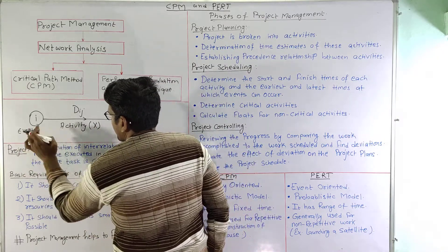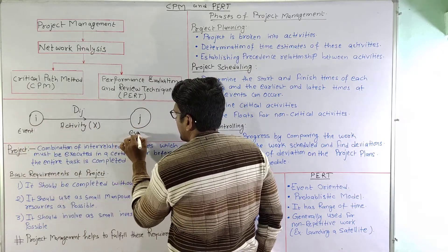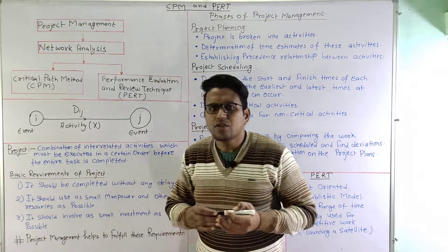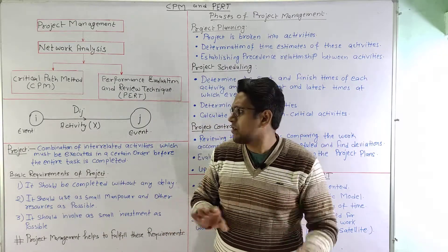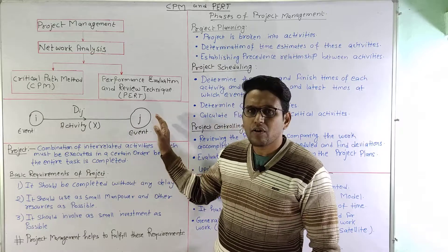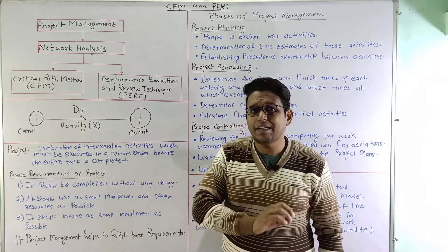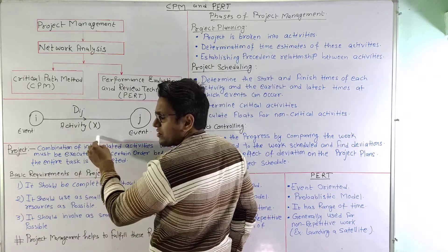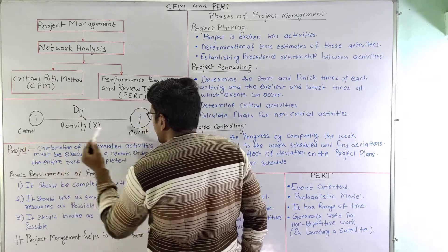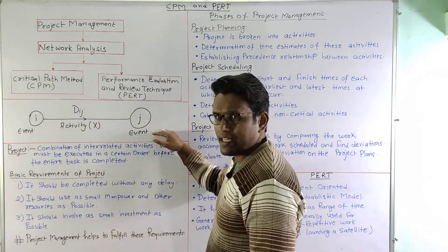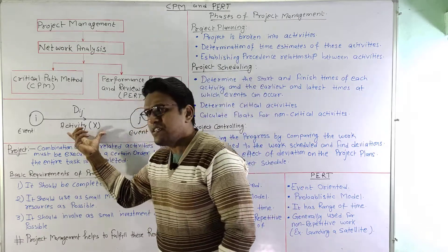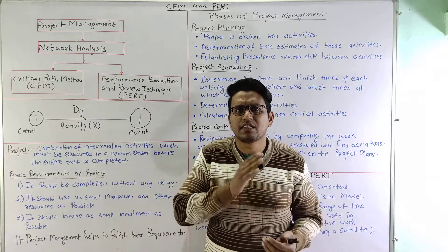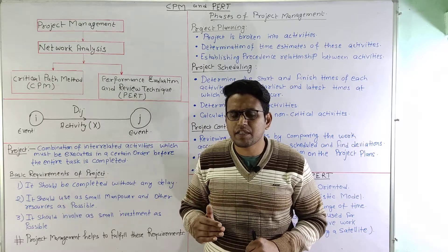The next term is event. The beginning and end point of an activity are called events or nodes. An event does not consume any time or resource. We should understand that an activity consumes both time and resources, whereas an event does not consume time and resources.